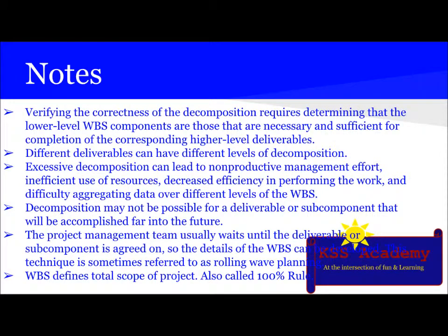Verifying the correctness of decomposition requires determining that lower level WBS components are those that are necessary and sufficient for completion of the corresponding higher level deliverables. Different deliverables can have different levels of decomposition. Excessive decomposition can lead to non-productive management effort and inefficient use of resources, decreased efficiency in performing the work, and difficulty aggregating data over different levels of WBS.